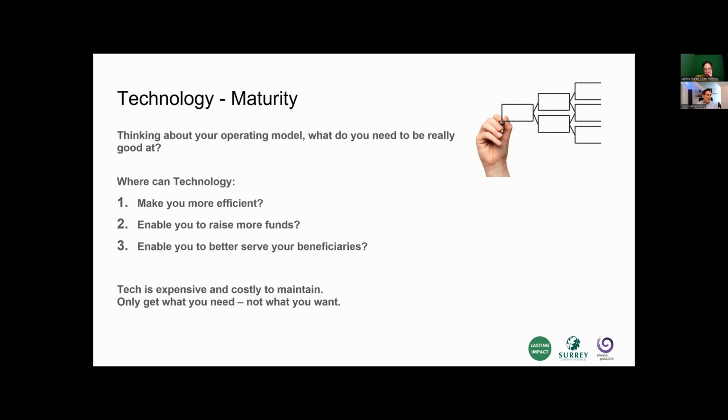What are the absolute must-haves, things that you really definitely need to have, otherwise it just doesn't work. Things that it should have because they're things that are really going to make it work well. And things that it could have, things that, well, it'd be nice to have, but it's really not going to change things a lot. And then the things you would like to have or won't have, which are probably just cosmetic, which could make a big difference, but really they're not that important.